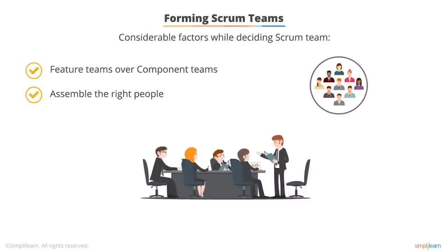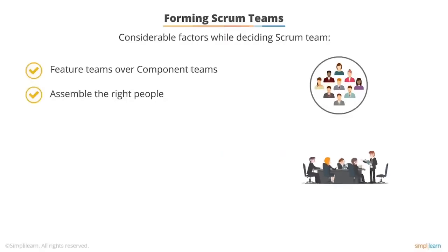Once a team has been formed, it's best to preserve and assign whole teams rather than individuals to projects. It's best to avoid assigning team members to multiple projects at the same time.